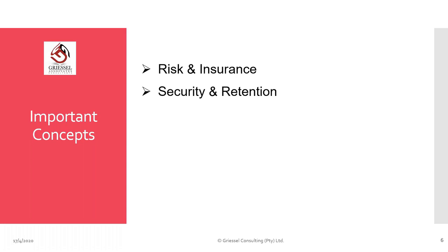Any losses that is caused by the acts or omissions of his employees, servants, or agents. If there's any interference with servitudes or lateral support. Any physical loss or damage where it's alterations or additions, meaning that there is occupation on site. And then any losses due to the occupation by the client or its own tenants. The insurance that is recommended here is that it must be 10% of the contract sum where the contractor carries